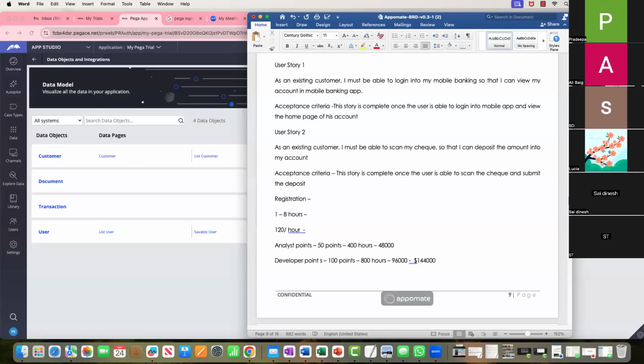They're going to ask you, right? But in reality, it's not like that. When you say 400 hours, that's the work hours, not for one analyst. It's for the junior BA, scrum master, product owner, manager. They're spending time there. You're sending emails. So it's including all the work hours, not the exact one-hour call you're going to have